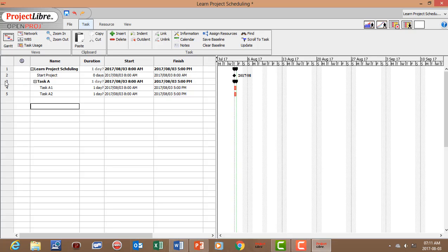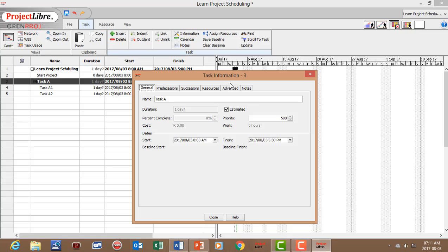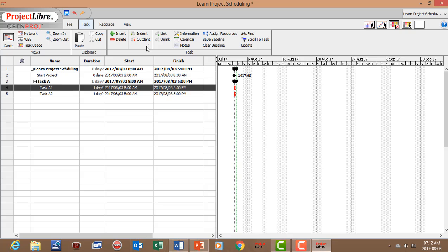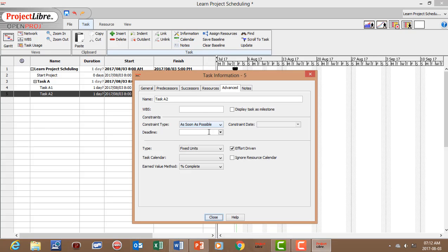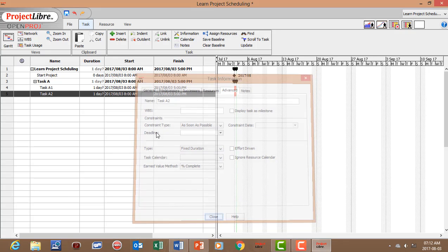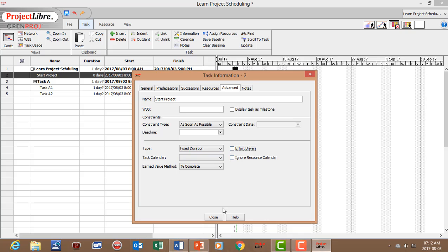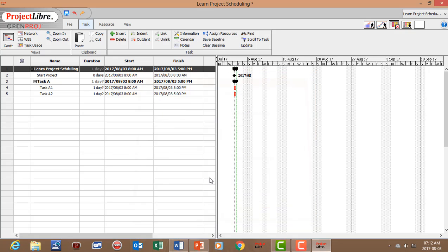The next important step is to ensure your Task Type is set correctly. Click on the task, go to Information, then Advanced, and select the Task Type. For this project we'll use Fixed Duration with Effort Driven Off, meaning the duration for each task stays fixed regardless of how we change the resources. We set each task to Fixed Duration, Effort Driven Off.